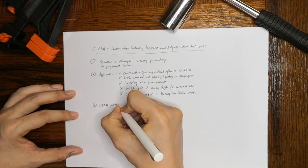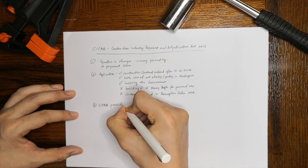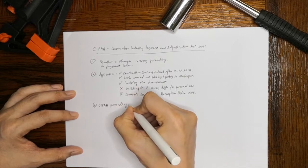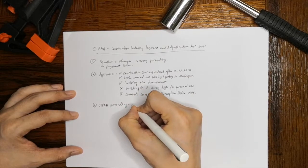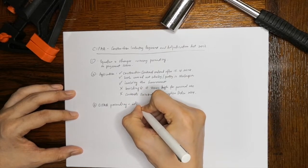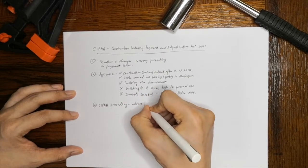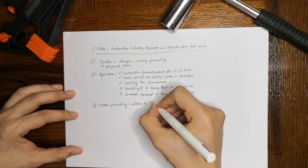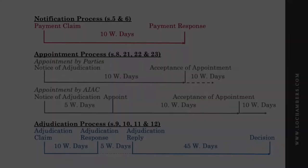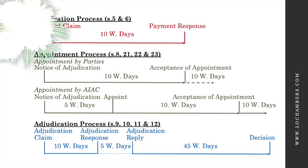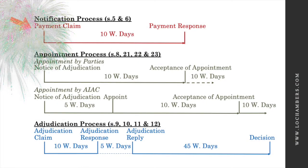To initiate the SIPA proceeding, the parties will be required to adhere to the strict timeline as prescribed in the Act. The unpaid party will first serve a payment claim on the non-paying party, who has 10 working days to respond.